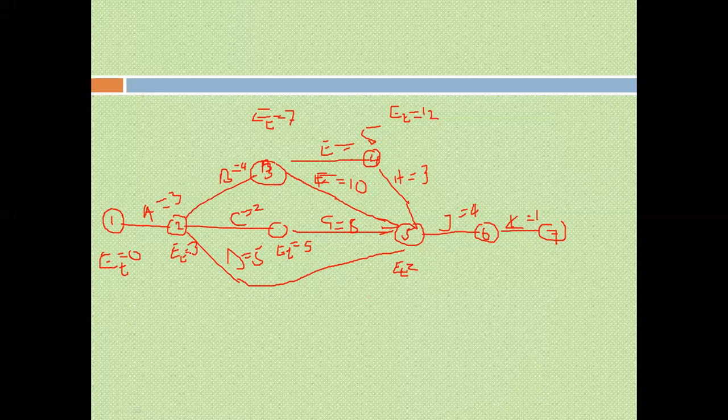And when you use the other road, you get 7, plus this, you get 17. Now when you use this other road, you get 3, 2, and 8, which gives you 13. This other route gives you 3 plus 5, which is 8. So the route that seems to give us the highest time is this one, which is passing like this. So it is giving us 17. So we pick the longest route.